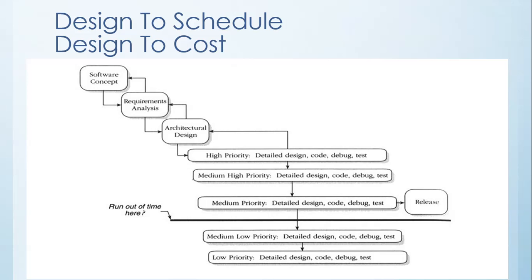This lifecycle model can be a viable strategy for ensuring that you have a product to release by a particular date. If you absolutely must have functioning software in time for a trade show, or by year's end, or by some other immovable date, this strategy guarantees that you'll have something. This strategy is particularly useful for parts of the product that you don't want on the critical path. So, for example, when Windows was being made originally, they used to have all of the minor system functionality tools like WordPad, Paint, and the game called Hearts. Microsoft might use the design-to-schedule for those apps to keep them from delaying the overall Windows build, for example.